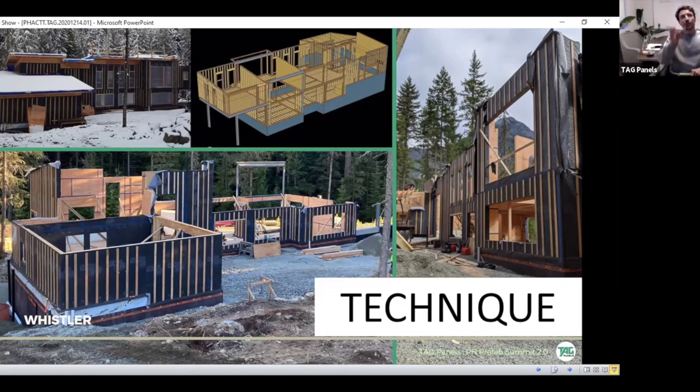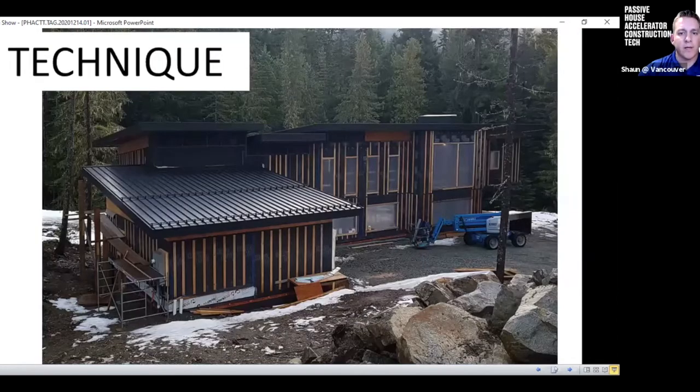So we took the opportunity to do some taller walls here. We're constrained by the trailers that we use, so we're in the 11 foot wide by about 36 feet length. We will try to maximize that as much as possible, but there's a great opportunity to do some tall ones here as well. So again, here's another view, with a little bit of the snow melted and the roof on. Again, nice that the general contractor closed up the building so they can work in a warmer spot.